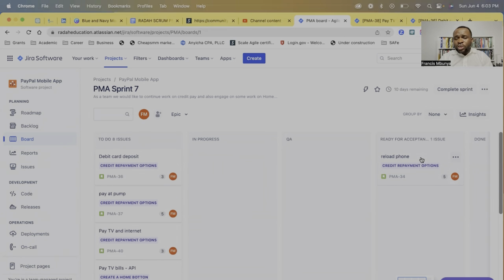The day you launch your sprint, you will not do a daily stand-up on that day, right? It's because that day the team members need to start looking at and working on something, start pulling it into in progress. You start seeing this reflected by the next day. All right, so now you understand what it means to commit to the right amount of work, and this is how you collaborate with your team to get all of this done. If you can understand this basic, the way I explained it at the beginning of this video, it's going to be easy going.